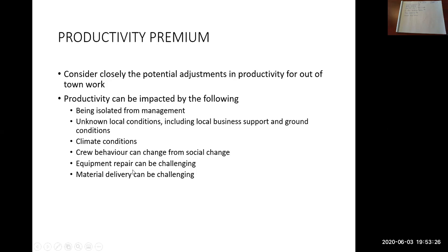Versus maybe out of town, you call the local gravel pit and you say you need 4 truck and transfers of road base. And they say, well, we've only got 1 truck, it's a tandem, and it's busy tomorrow. So you've got to wait till the next day, and you're only going to get 14 tons at a time instead of 40 tons. So things like that drastically change your productivity.